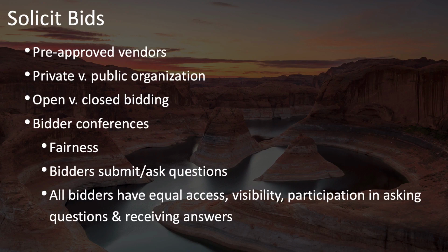Or there may be times where, because of different time zones and other factors, that some people can't be in attendance either face-to-face or remotely in the moment. And so you'll need to record what happens in the meeting, give them an opportunity to review everything that happened in the meeting and have equal access that way.